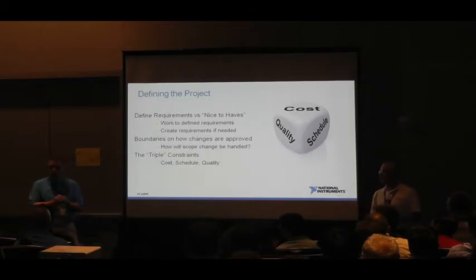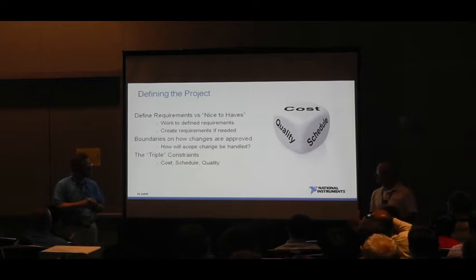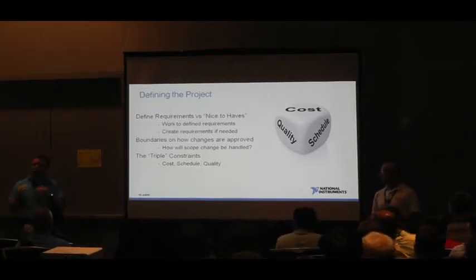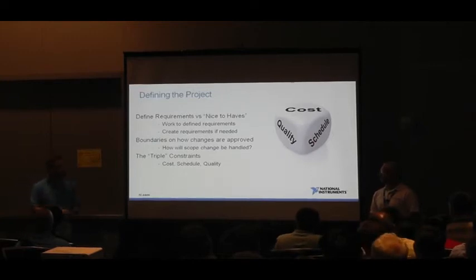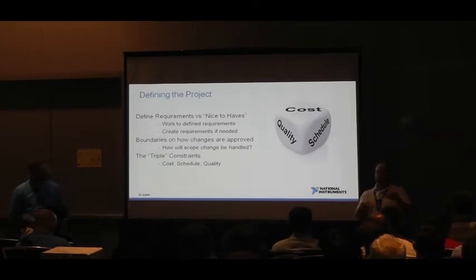So what about if the customer changes their mind while you're working on the project? Okay, yeah, so if the customer changes their mind, and I believe you addressed that a little bit later, but that's something you're going to have to negotiate because that is a change in scope. Right. With fixed price agreements, you agree to do a certain amount of work, no matter how long it takes. And so, you've got the responsibility. You own the risk. With time and materials, the buyer owns the risk.